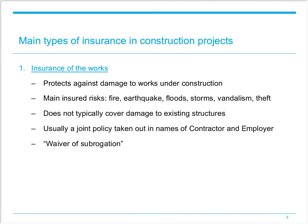Normally, works insurance takes the form of a joint insurance policy taken out in the names of both the contractor and employer. Generally, a payment to one co-insured will not entitle the insurer to subrogate against another co-insured. This means that if damage occurs which is the responsibility of one co-insured, the insurer cannot sue that party for the damage because the policy was also for their benefit. Issues relating to subrogation will be the focus of our case studies later in this webinar.